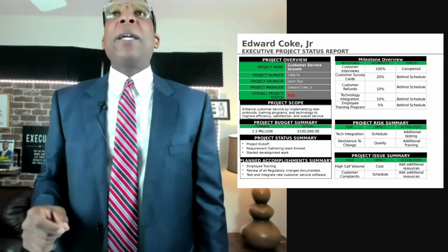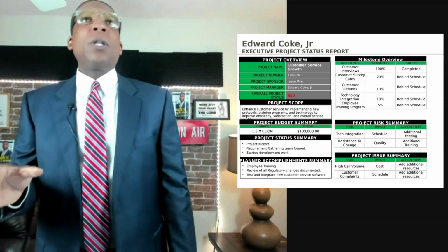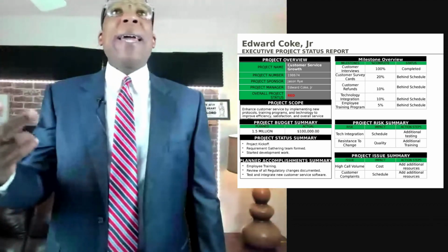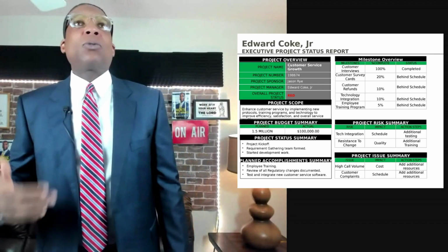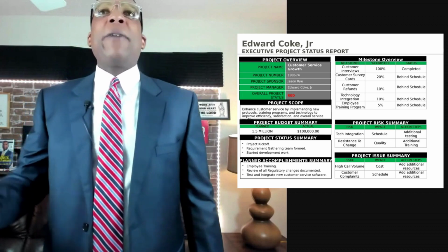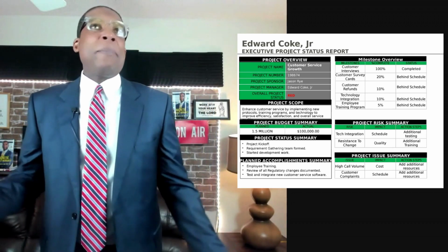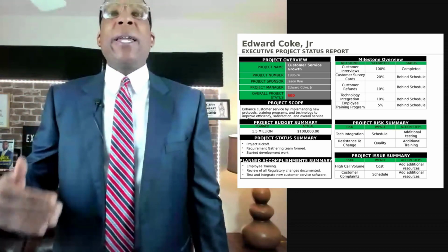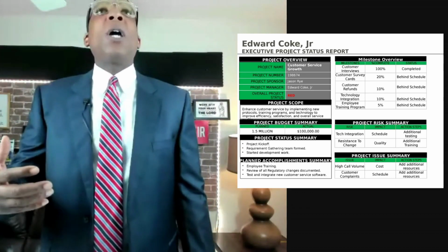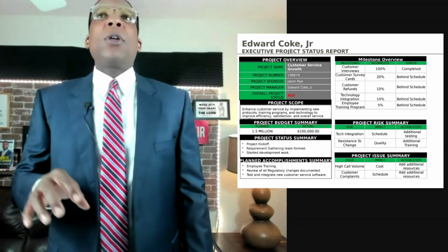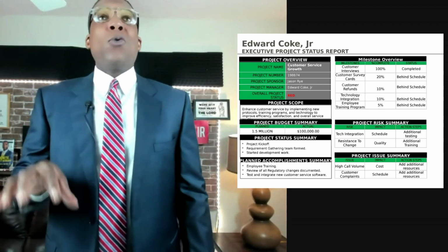That is key. Also, if you really want to get a little fancy, you could just put the differences, meaning plan minus actual. How much money do we have left to date? Because executives may want to know that, or they may just run the numbers in their head. Again, it depends on, let me stop because I just thought about something. It all has to do with who your audience is and who the executives are.